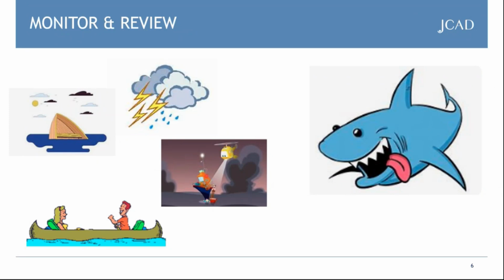You also need to think about whether your current controls are still in place and working effectively, or have you seen evidence that something isn't working quite right? And does this mean that the current risk is higher now than you first thought? Maybe you've completed some of your planned actions. So when reviewing, you'll see that some actions have already been carried out. Does this mean the current risk has reduced, just as maybe you anticipated it might? So this stage does allow you that time to think about all these different factors and about your risks generally, maybe rescoring and reprioritising them as required.